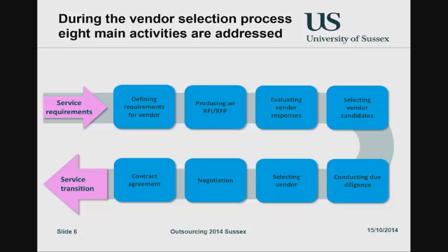We're then going to do a process known as due diligence, which means looking, in effect, at what the supplier can do now. Can they actually do this? I know perhaps you also have to look at the finances and whether or not they're stable and all of these good things. But the most important thing from an operations perspective is to really define whether or not they can do it, because it's often not so clear.